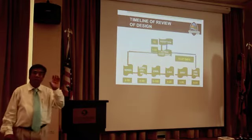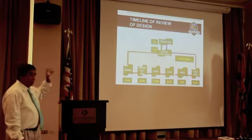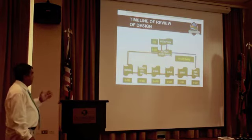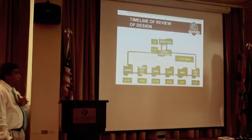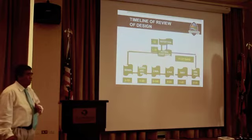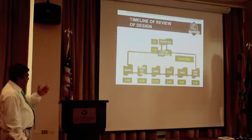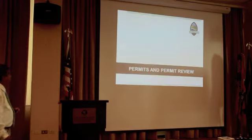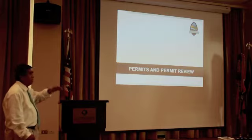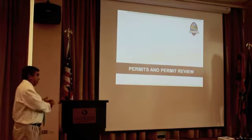Okay, we're talking about design review, which requires 3 submittals: 30, 60, 90, and 100%. So we have 11 to 37 days. The 11 means the fastest way to do it, and 37 means it should be the maximum unless there are some other issues that we learn during the process. Okay, that was the design. Now we are going to the permits and permit review. Again, this applies to all other projects except the military project.